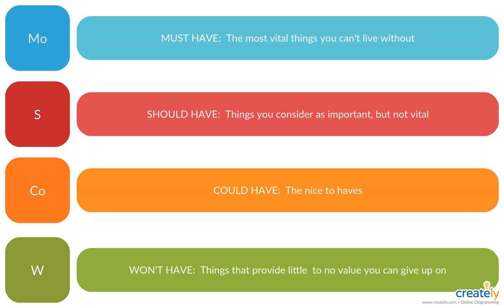So, quick question. When we're first working with a customer and we put together the initial backlog, they're the ones who decide which items are must have, should have, could have, won't have. So they're the ones setting that up. What stops a customer from saying I want all must have? I guess this may be simple: if everything's a must have, then we set the budget pretty high because we need to get all of that done. We're just factoring that into the overall time and cost of the project.